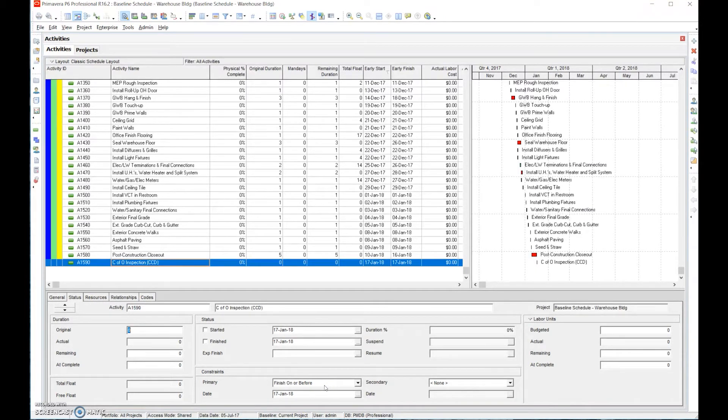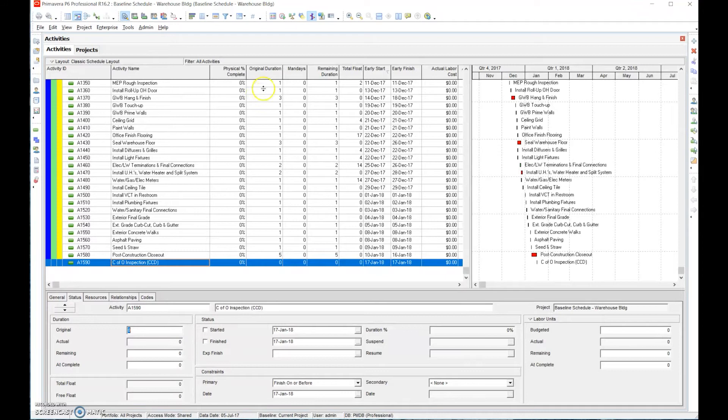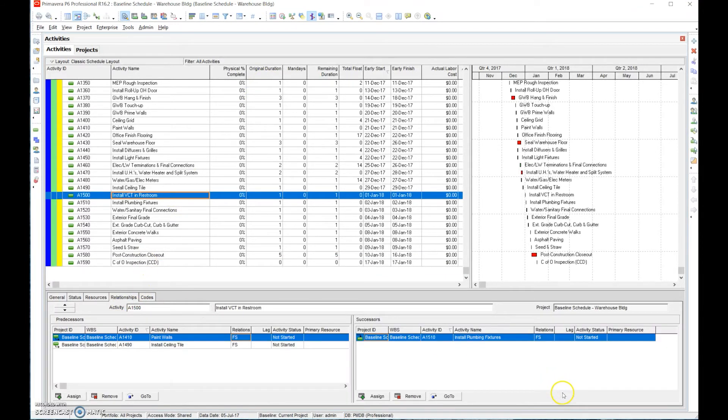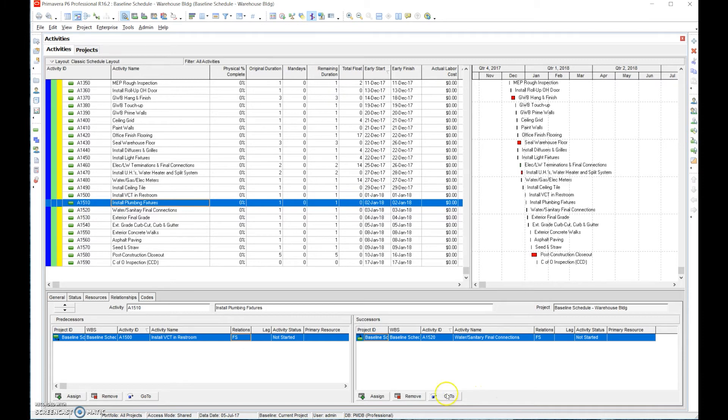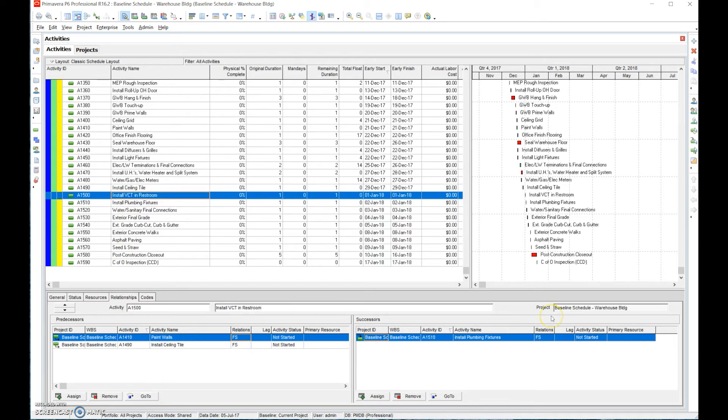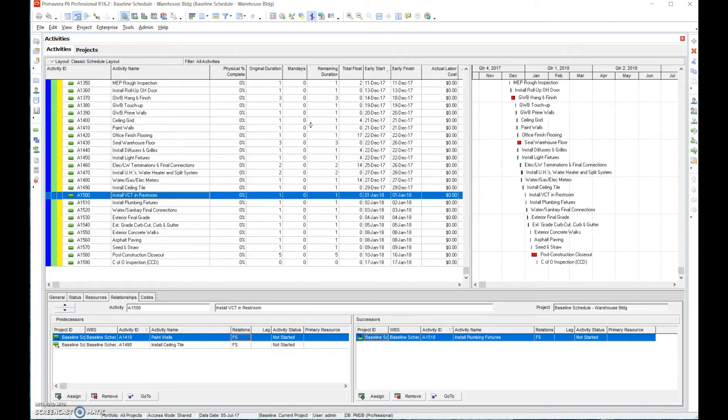Now moving on to successors here. Remember we should have at least one successor for every activity. A successor one is a predecessor of the other. So if the successor of VCT in restroom is installed plumbing fixture, if we go to here, we now have gone to the plumbing fixture and that successor is a predecessor of it. Just understand that a predecessor one is a successor of another. So when we go through all the activities and put all the predecessors in, what we have done is we've created successors for others. We've gone through methodically and put all the predecessors. Now we're going to go through methodically and put all the successors.